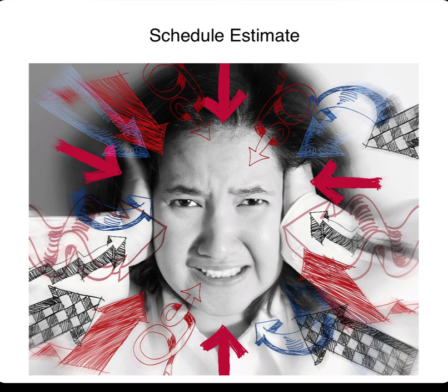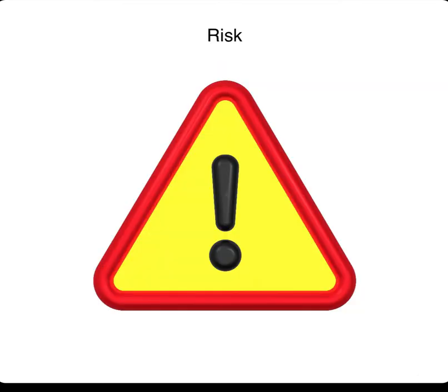Let's look now at the potential risks involved. There's always risk involved in a project, no matter what the size. The larger the project, with its demand on capital and justifiable results, the more important it is to define the risk and establish how this will be planned for. The strategies to manage risk could include transferring the risk to another party, avoiding the risk, reducing the negative impact of the risk, and accepting some or all of the consequences of a particular risk.